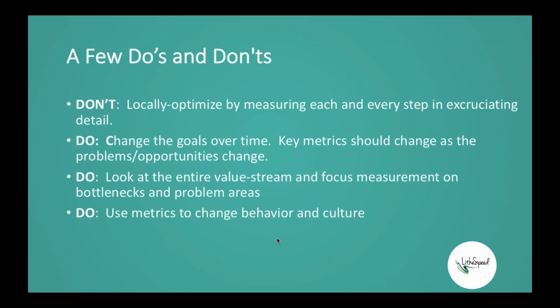A couple of do's and don'ts. I really want to caution people from locally optimizing their particular function. The value stream to go from idea to delivery is really long. In the business, we have to go through funding cycles, the PMO, high-level requirements, detailed requirements, development, testing, deployment, all of that stuff. And if you try to locally optimize any one of those functions, if you try to make it perfect, that will end up slowing down the steps coming into that function or coming out of that function.